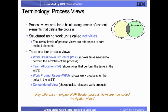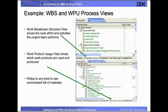Process views are hierarchical arrangements of content elements that define the process. There are four basic process views: the work breakdown structure, which shows the tasks needed to perform the activities of the process; team allocation, which shows the roles that perform the tasks in the work breakdown structure; the work product usage view, which shows work products for the tasks in the work breakdown structure; and the consolidated view, which shows tasks, roles, and work products. These views, just like content definitions, can be published to the method website, but they also contain information needed by project managers that can be exported as templates for project management tools. These views can only be seen by opening a process definition in either the library view or configuration view — select the process in whichever tree, double click on it, then click on the appropriate tab at the bottom of the editor.